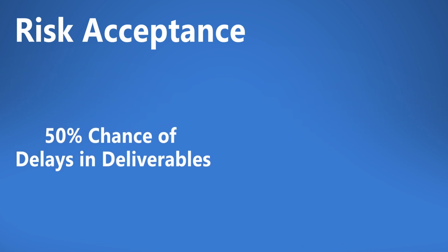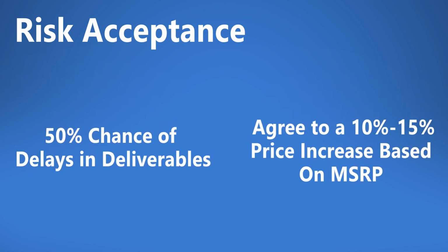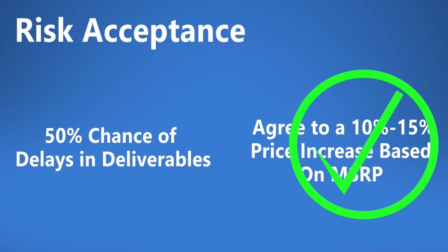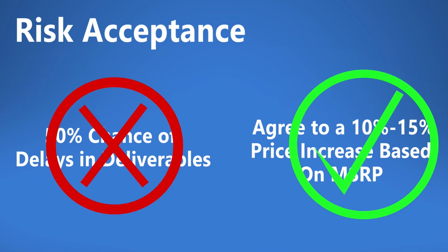And risk acceptance. In some instances, the cost of managing a risk might outweigh the potential harm. In such cases, organizations may choose to accept the risk and devise a contingency plan should the risk event occur.